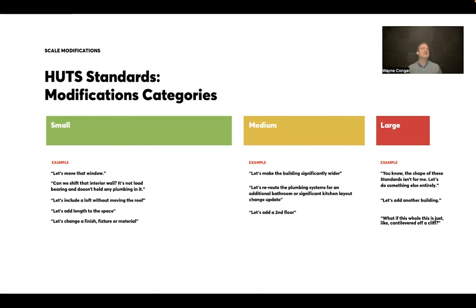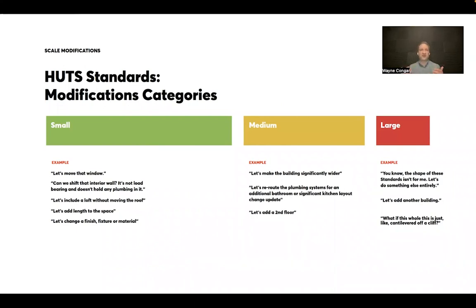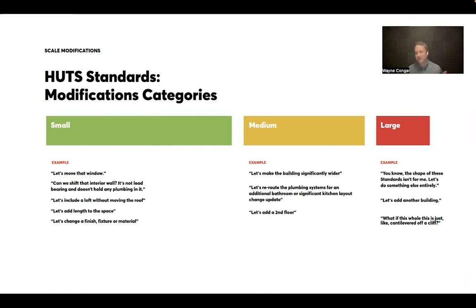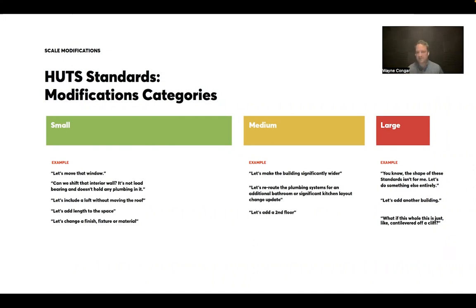And so it has these sort of downstream effects where we need to make sure that we're accounting for that level of change. For things like, hey, let's add a second floor. Something that we certainly do and have done and often makes a lot of sense. But right out of the box, we kind of think about that as a medium scale modification. And then in the large side, and we have heard things like this, and we do have an approach for how we address it, but we go start down the project and folks say, you know, the shape of these standards just isn't for me. Let's do something else entirely. Well, in that case, we're kind of talking about a new scope, a new approach, something different from our standard selection plus modifications process.